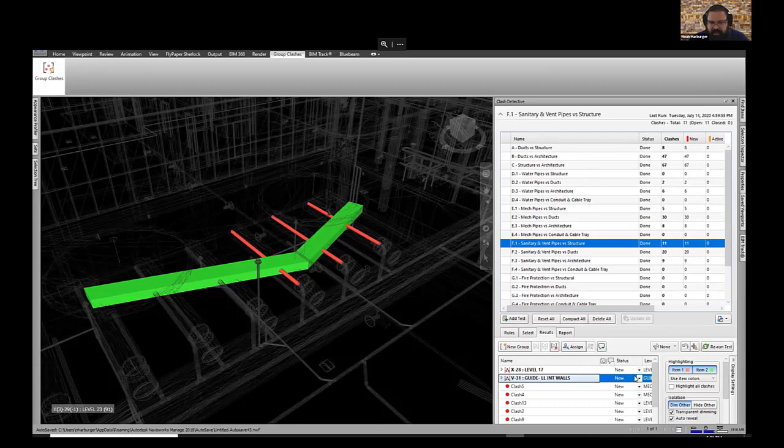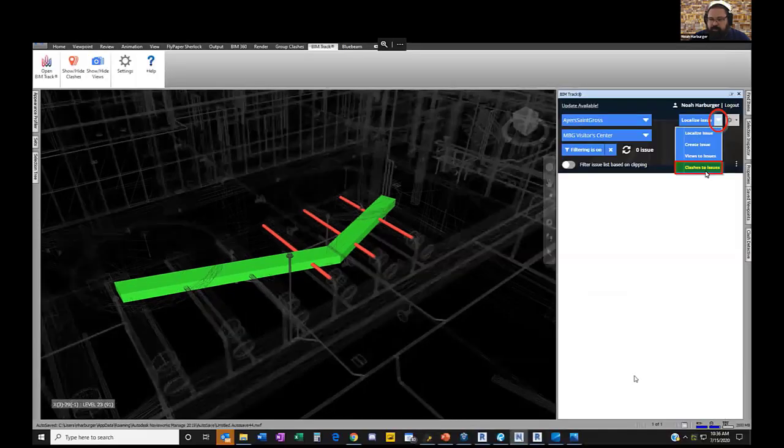If there's a clash that, like I said, is a pipe just running vertically up through a ceiling, that's fine. We know about it, not a problem. But if there's something that we want to look at with the team, or you want someone to fix, or at least another person will put eyes on to determine if it's a problem or not, we'd change the status to reviewed.